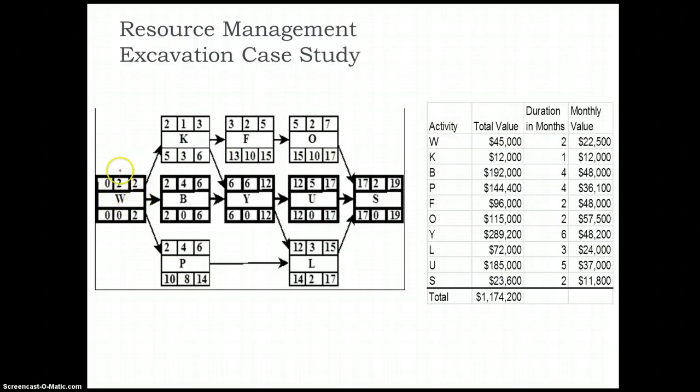And the first thing we will do is we will have to study what are the key activities, what is their logical order, and based on this, we will draw this logic diagram, or it's also called an activity on a node diagram, which essentially tells us about the precedence relationship. So basically you can see, for instance, between activity K and W, there is a finish to start relationship. So this basically tells us that activity K would only begin once activity W has finished.